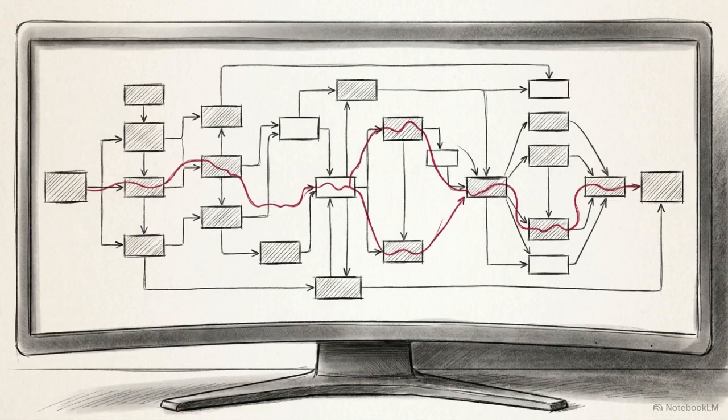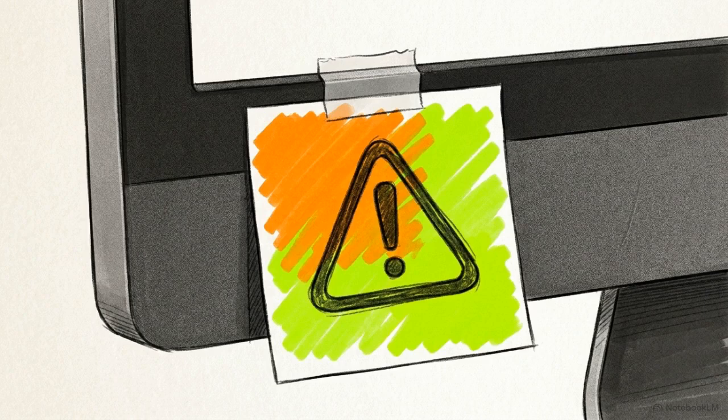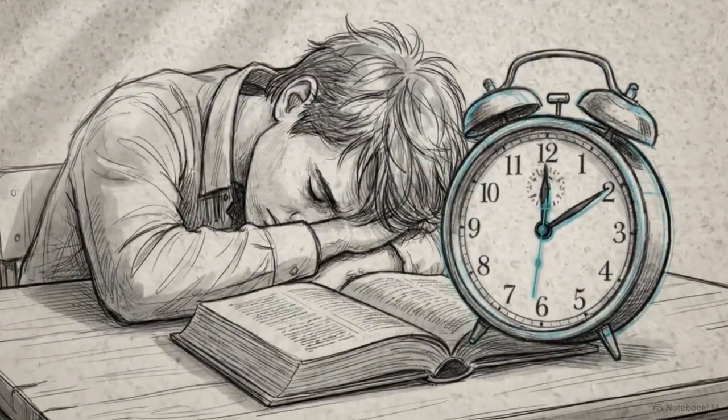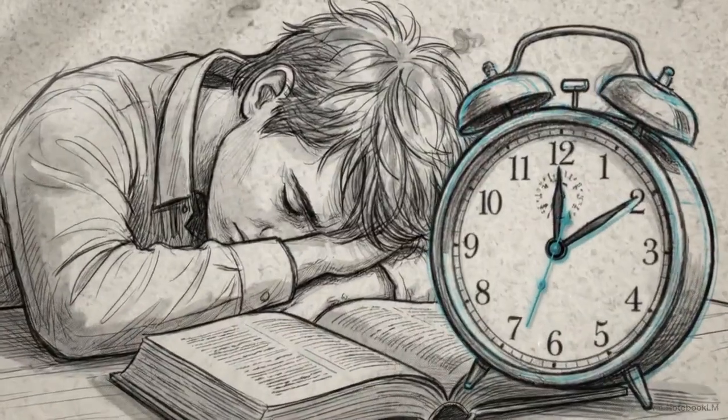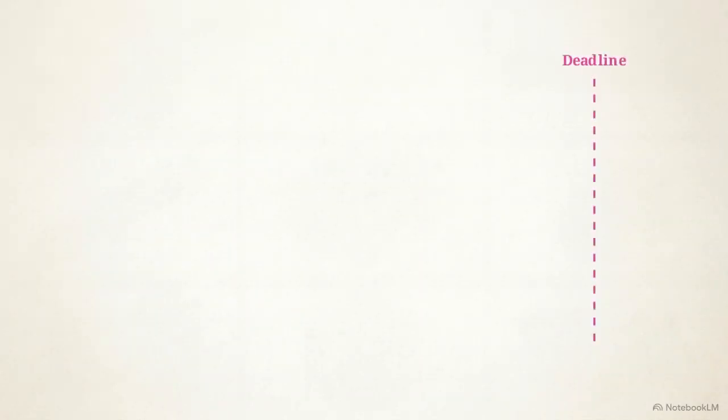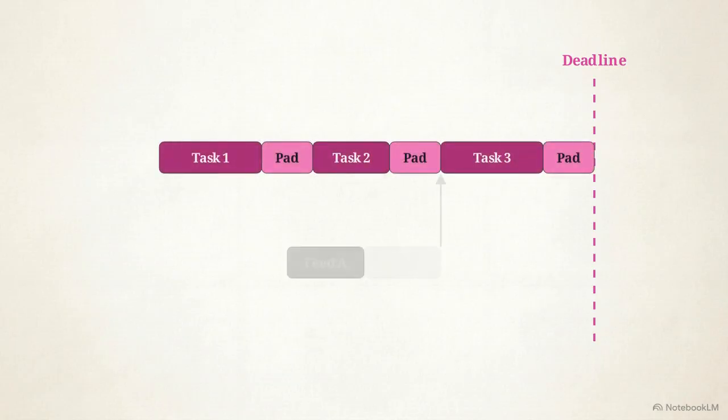Next, map out all task dependencies and resource conflicts in your software to identify your project's critical chain. Here, we have to watch out for student syndrome. This is the psychological tendency for teams to procrastinate and waste their localized task buffers simply because they know the extra time exists. This Gantt chart simulation demonstrates how to solve that.